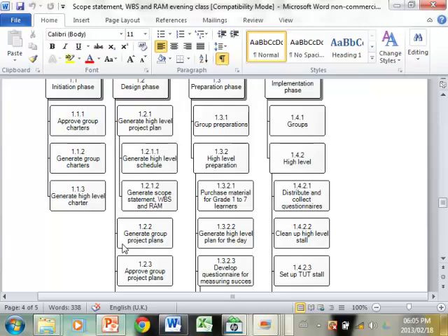So all that they have here is a scope or a statement of work, what the specification of the engine is, and they give that to Rolls-Royce. And Rolls-Royce will then take that and make their own work breakdown structure, which will be called engine.